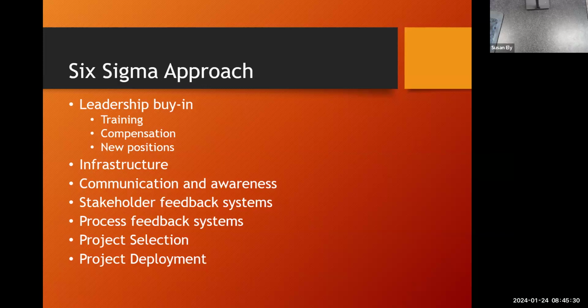So for example, Hunter and Brendan are doing their senior design project, and I am the stakeholder. They have been greatly delayed in receiving their robot, which may in fact change their scope. That's a conversation they need to have with me. Once the robot arrives and they pull it all out and start looking at it, they may come back to me and say, Dr. Ely, I know we had talked about getting X, Y, and Z done, but because of the delays, we can only get X and Y done. That's something I shouldn't find out on May 5th. I should know that now, right?